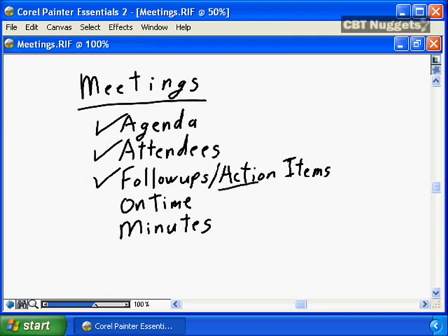Do not drag a meeting down while two participants in the meeting have a 10-minute discussion on how to resolve something. Give them an action item. Say, go away, resolve this, and then report back to the meeting attendees what the resolution is going to be, or worst case, let's schedule another meeting to review your recommendation and alert all the remaining attendees of what that recommendation is going to be.